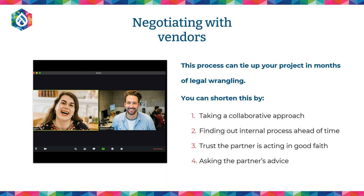Yeah, it's a very common thing that you have certain institutional requirements that you have to solve for. For example, it's very common that people have milestone-based billing. Like, we won't pay until the design phase is finished or something along those lines. And asking your vendor to help you solve that is very, very valuable.